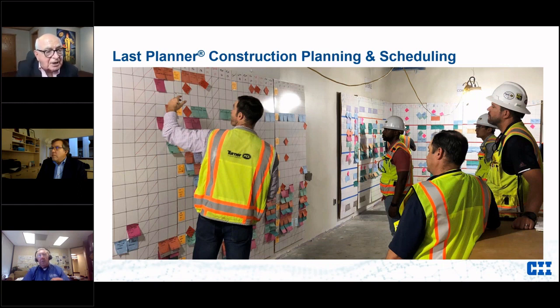And it's similar in design, except designers typically will do it with Kanban boards. That's where you have work to do, work in process, work done. And so they'll have their week's work in the work to do side of the board, and they'll move it one at a time into what they're working on currently and then what's done. So there's a variety of ways to do it, but it's similar in both cases.